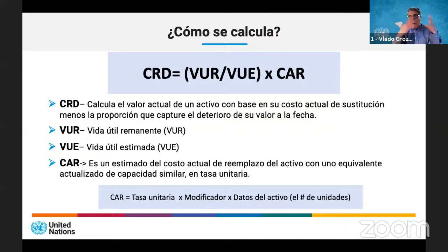For example, if we have a construction of a building, we see the planning, design, construction, and during construction we need supervision, so we have to include those costs also. And in the end, in some cases we have to add value added tax. So don't forget that, it's very important.